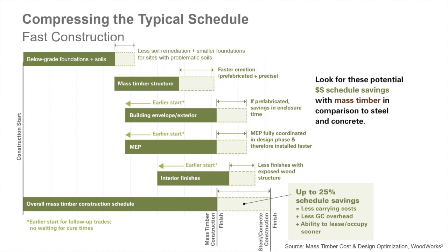For the MEP bar, our fourth bar, again, since there's no time to wait for concrete to cure, follow-up MEP trades can begin work shortly after panels are placed. So it's also recommended to fully coordinate the MEP in the design phase so that it can be installed faster in the field for additional savings.